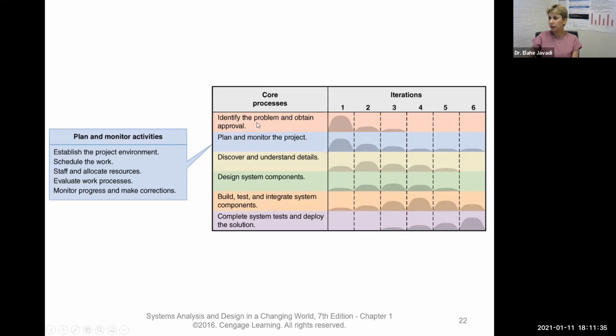What's happening here? You spend a lot of time on identifying the problem and obtaining approval. You spend a lot of time on planning and monitoring efforts. You spend a little bit of time on discovering, a little bit of time on design, a little bit of time on building and testing, and no time on deployment because you don't have anything yet. This is just the first iteration. So go ahead,